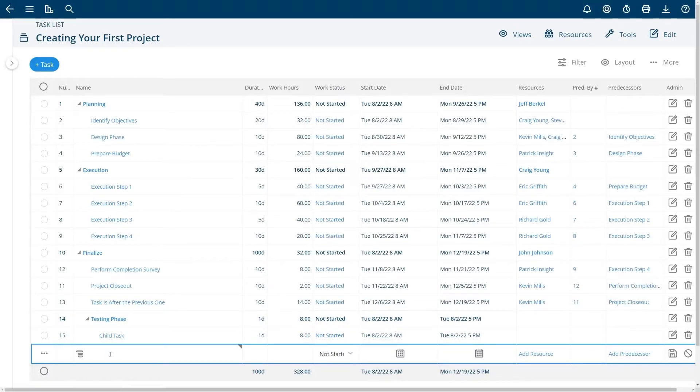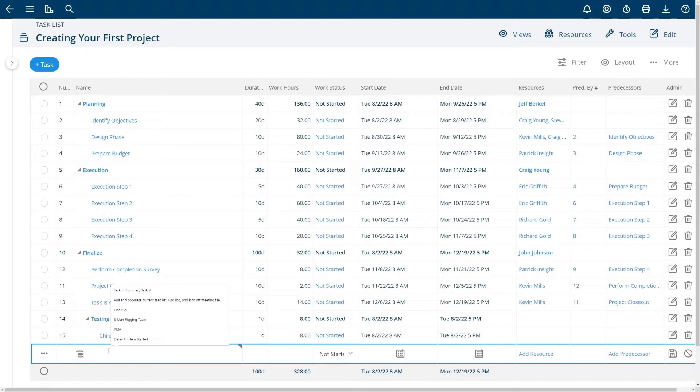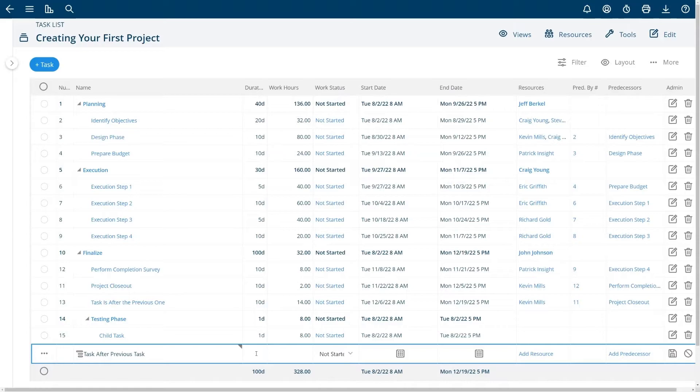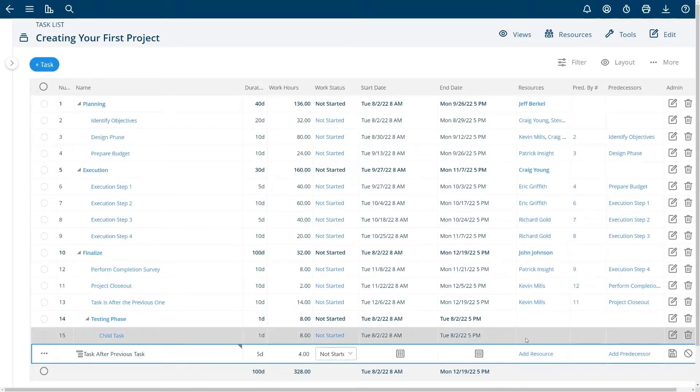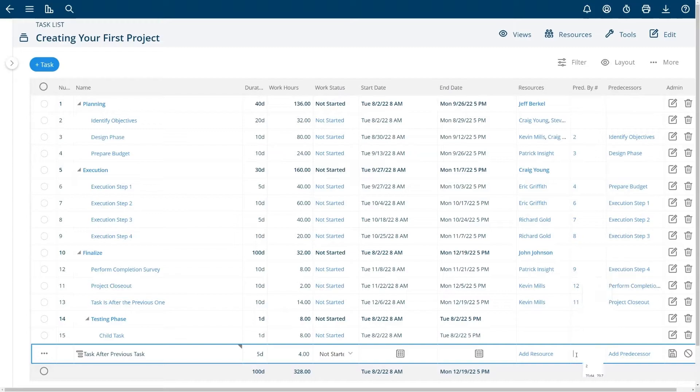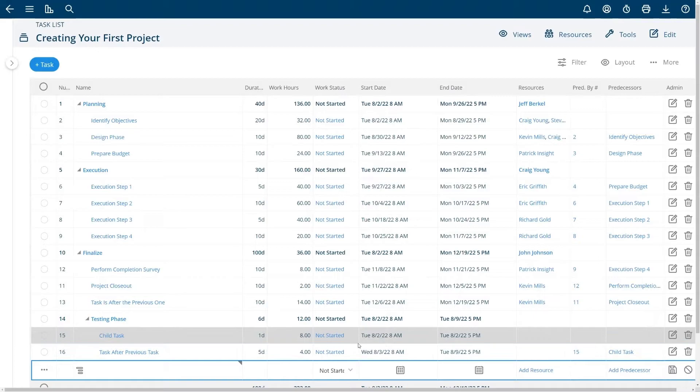If I want to make a successor task which is the task that happens after the previous task I'm just going to name it for the purpose of this demo. I'll give it five days to get done with four hours of work. If I would like this to happen right after the task before it, note that this is task number 15. I can simply choose 15 in here and I can hit the enter key.